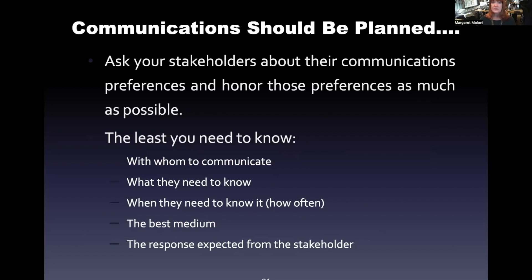What you want is a communication plan. It can be simple — it can be a matrix where you list with whom, what they need to know, when they need to know it, and what you expect from them.